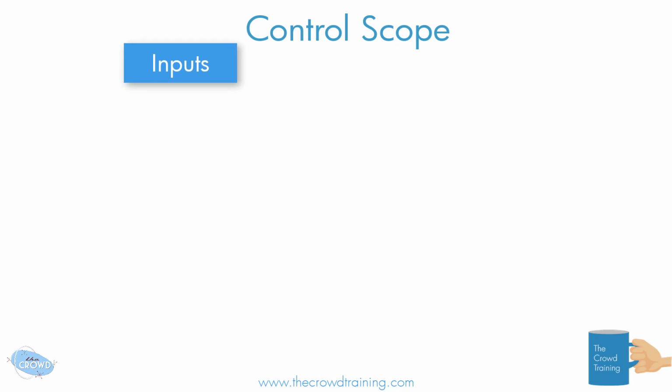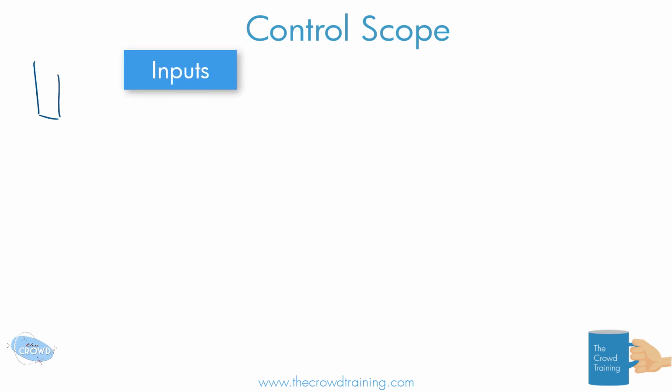So you need to know the plans, and hence, as an input, we're going to have our project management plan. And as you know, I like to draw it as a file folder because it contains all the different plans that we are needing to look at. Obviously, the costs, and the schedules, but really, if you think about it, we're controlling the scope. So the scope management plan and the change management plan and requirements management plan, all those different plans that we need to look at, and including the scope baseline, because that's what's possibly going to change.